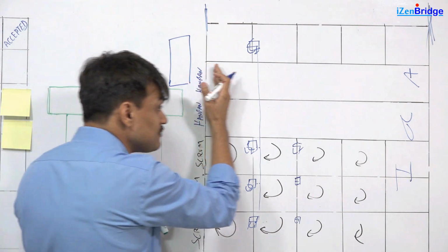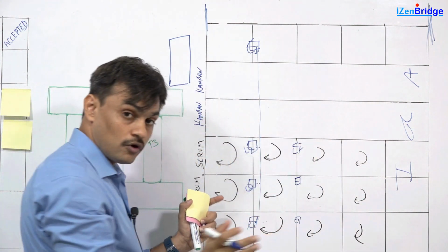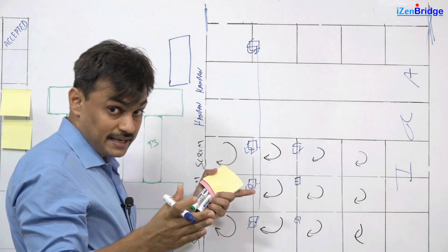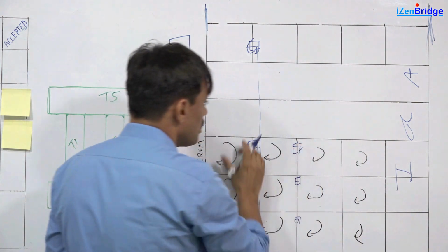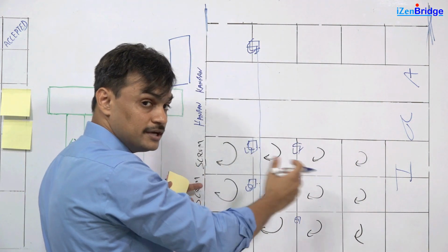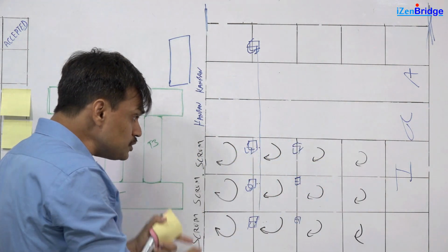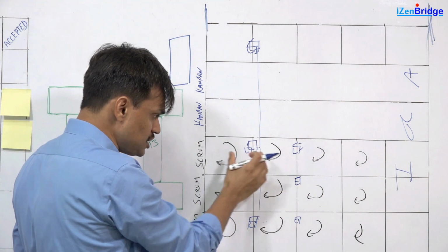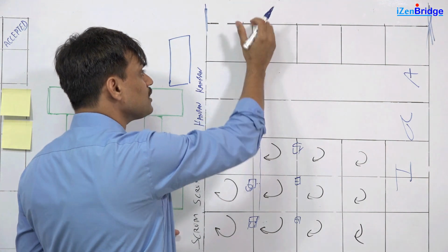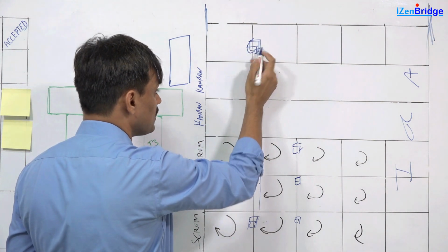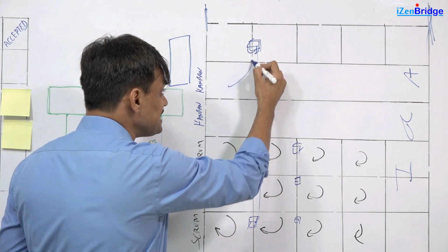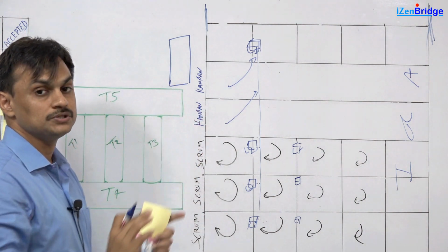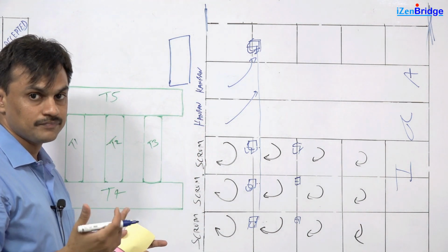But the Kanban team may keep working across this time window of say 10 weeks, but the 9th and 10th week is inspect and adapt. So I can say for the 8 weeks, they may have things coming at a later stage, but still they need to plan and they need to commit for the overall boundary. And they also need to participate in program level events. So the Scrum teams at the end of an iteration produce a demo, and all this work goes to a program level, and you produce a system demo. So the Kanban teams also participate in the system demo. Their work also goes inside that particular 2-week frequency system demo.